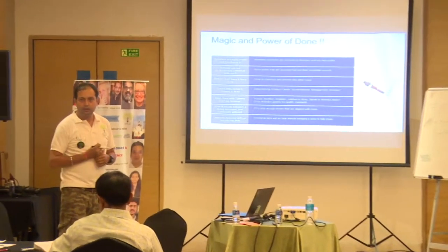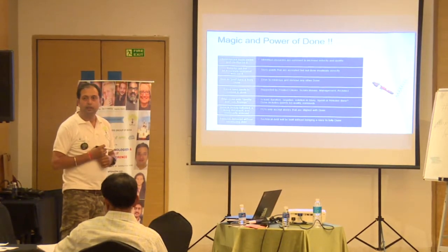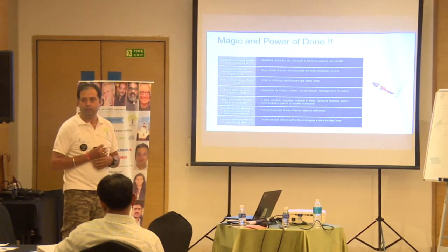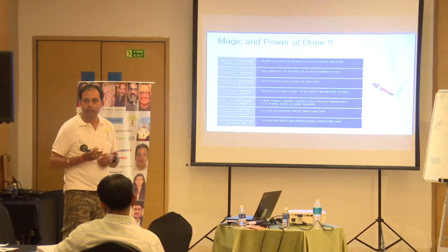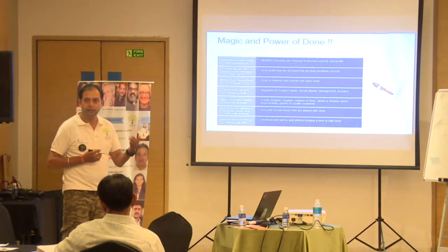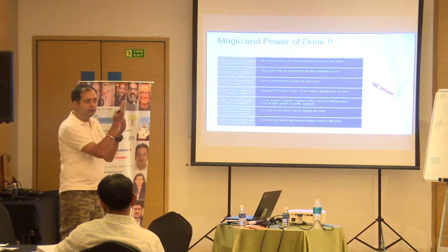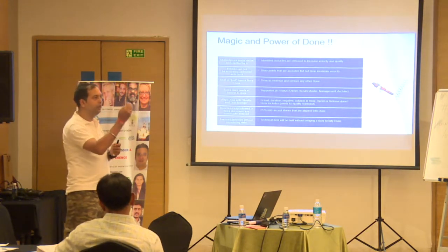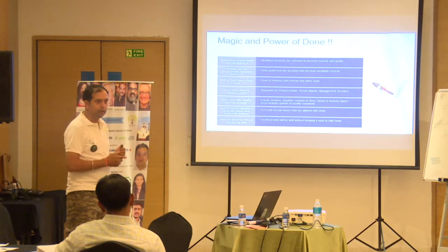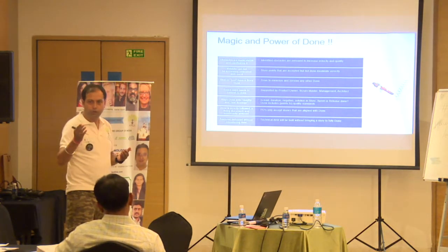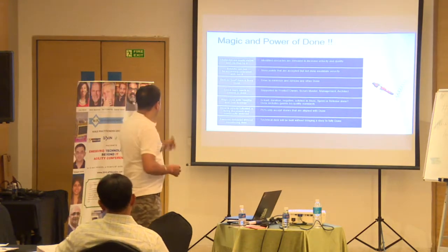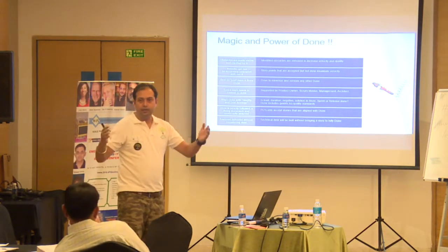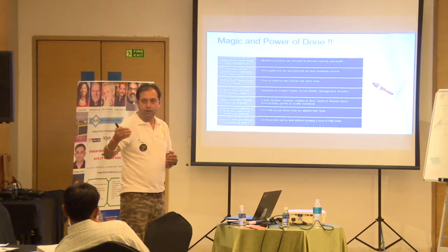When we started this DoD with our team, suddenly we started seeing many obstacles. Obstacles were getting visualized more and more. Teams were able to identify because they had all the granular tasks in front of them to meet the DoD. And when they were not meeting them, there was some reason not to meet them. And they started raising the obstacles. Was it a bad thing? No. It was not a bad thing because it was giving us a larger picture to resolve and get to a point where we can really improve our quality.